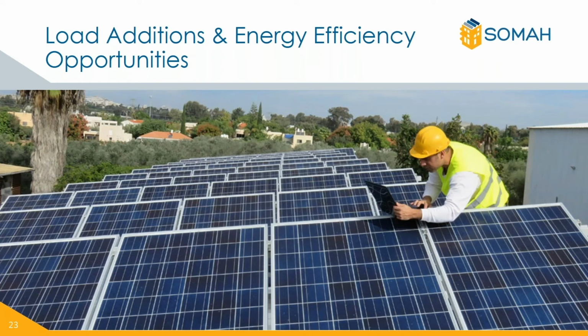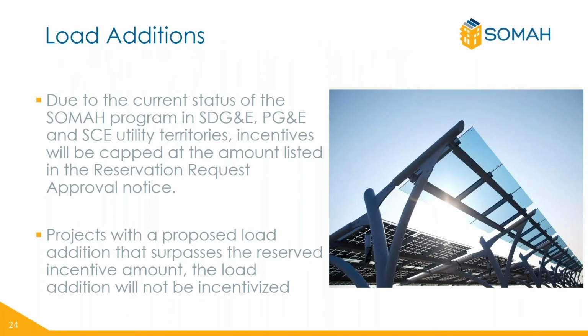Now, I'll spend the next few minutes going over load additions and energy efficiency opportunities. So, due to the current status of the SOMAH program, incentives will be capped at the amount listed in the reservation request approval notice. Please note that this is only the case for utility territories on a wait list, so SDG&E, PG&E, and SCE. If a project has a load addition that surpasses the reserved incentive amount, the load addition will not be incentivized.